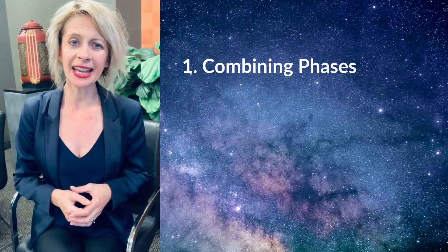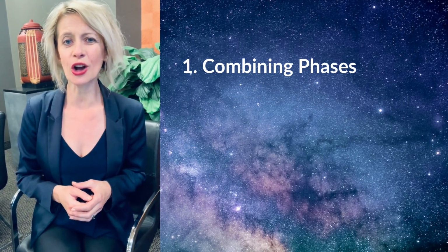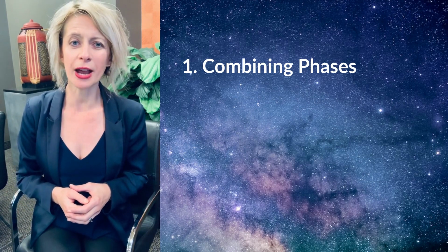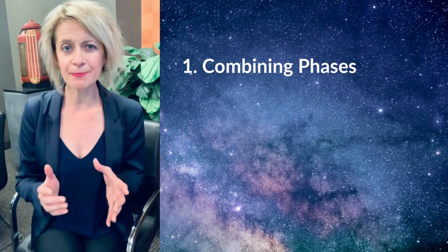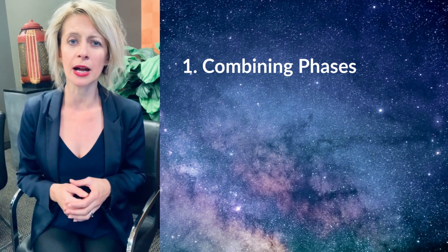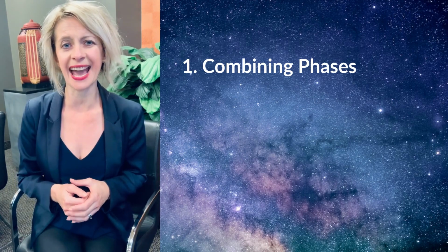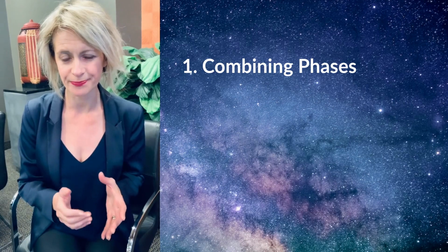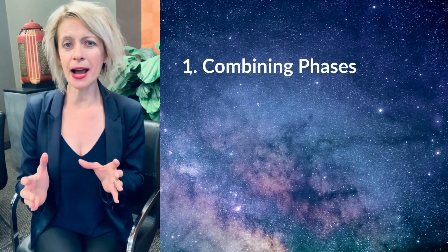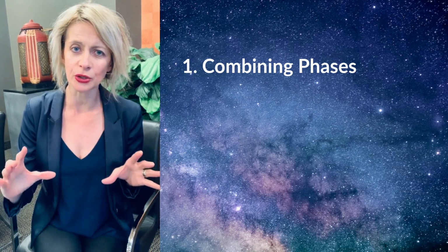So generally speaking, it's a suitable approach for those opportunities that don't have many solutions to analyze, and rather a straightforward approach might be best, like some sort of improvement initiatives or brownfield modifications with a low level of risk and stakeholders engagement. However, we need to understand the impact of combining phases versus a typical development using all 5 phases.